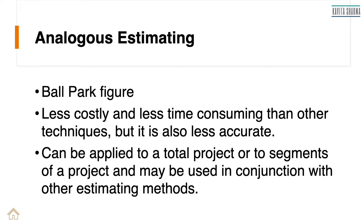So analogous estimation, analogous are also called ballpark figure. These are less costly and less time consuming because I'm not elaborating on the scope. It can be applied to total project, at the earlier part of the project life cycle to arrive at the overall schedule or at the time of sales part of the project. Most inaccurate, but it justifies itself because you're not putting in a lot of efforts in coming out with analogous estimates.